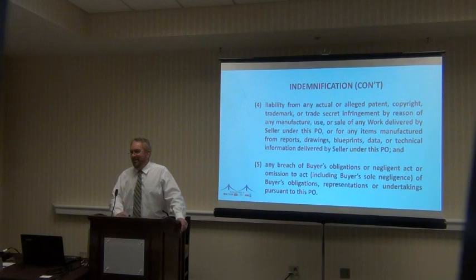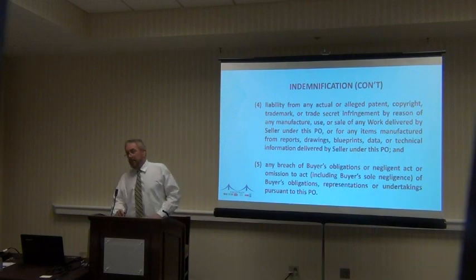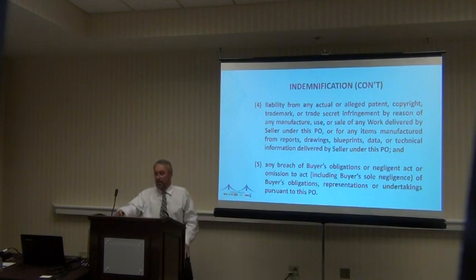We just saw a City of McKinney, Texas, bid proposal. The indemnity language caused the contractor to accept all the elected officials' negligence, whether related to the job or not. Oh my gosh. And of course, we pushed back, and our contractor said, hey, remove that provision and I'll stay on the bid list, and they wouldn't. And six contractors stayed on and did that project. The way that it was written, the elected officials' actions did not have to even be relevant to the project for the indemnity.